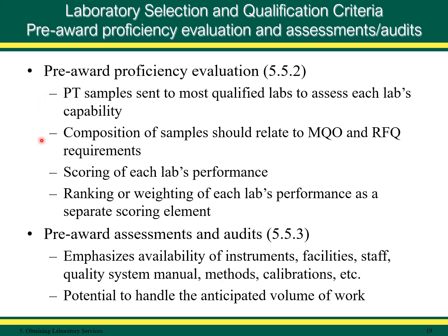The composition and number of samples should be determined by the nature of the proposed project. Each lab's performance on the PEs can be scored and then used to rank or weight the lab's performance as a separate scoring element in the proposal evaluation scheme.